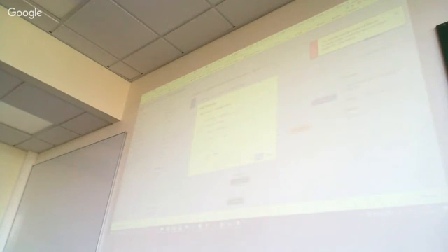Yeah. In a normal workflow, you either keep it in review until you discuss it and then it goes back to in progress, or you push it back to in progress. You usually do have blocked. Blocked is something that you can have, but that's usually when there's something specific that needs to happen, right? So you're waiting for an external thing to happen, or it's gone beyond you. I'm no longer reviewing it. It has to go to the product owner, or it's blocked because we have a technology issue, or there's an issue that you say is blocking. Then you have to identify which resource is blocking that, right? So just not accepting the issue, like saying in review, oh, it's not ready yet, that would normally be a pushback. Yeah, it usually goes back. What you'd normally think of as the blocked transition is usually an external thing, because that's something your team can't resolve internally.